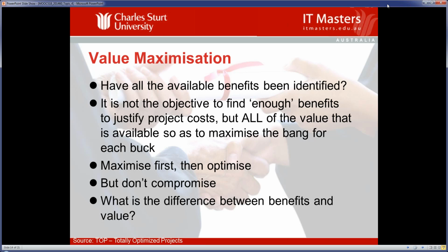So some of the benefits are simplification of single provider, one-stop shop, those sorts of areas. But then what's the value? How do you associate the value? What happens if the numbers of people in the organisation change? We're not going to get a 10% reduction in our operating budget. What happens if all of a sudden there's other groups that come in and start using our printers? And if we're trying to track the benefits, well, we've lost it. We need to understand and track in these instances the value drivers and the changes of the assumptions. So if our operating budget saving goes to 3%, that in fact may be very good. Just a concept there that I wanted to think through.